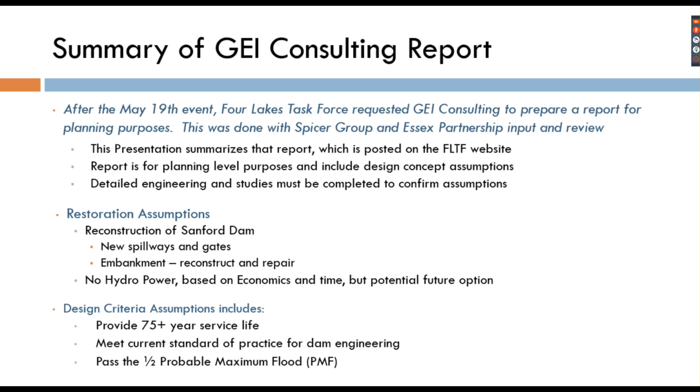As we move forward, obviously detailed engineering will be required and additional studies will be required, and things will get updated as we go. But the initial assumption made when the report was prepared is that the Sanford Dam will require a full reconstruction. So that means we would be looking at new spillways, new gates, and essentially a new embankment.